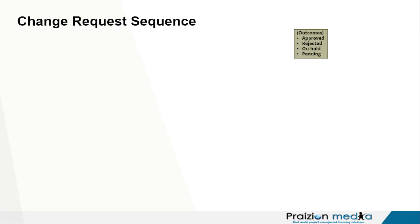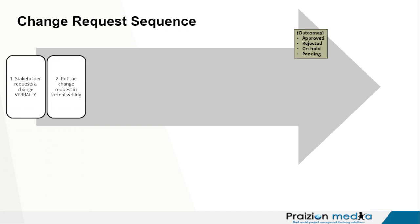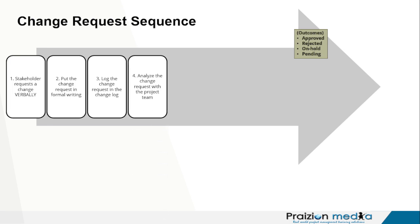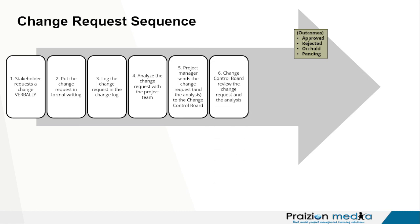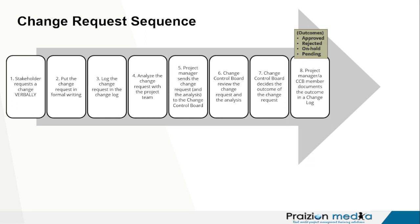Let me show you the flow for change request because it could help you on your exam. You may get a verbal request — put it in formal writing, log it into the change log, then analyze the impact from every perspective: how does this change impact schedule, cost, scope, resources, communications, risk, procurement, stakeholder? You want to look at everything. Then you send the change request and your impact analysis to the change control board. If there is one, they review the request and decide the outcome of the change, logging it in the change log and sharing it with stakeholders.